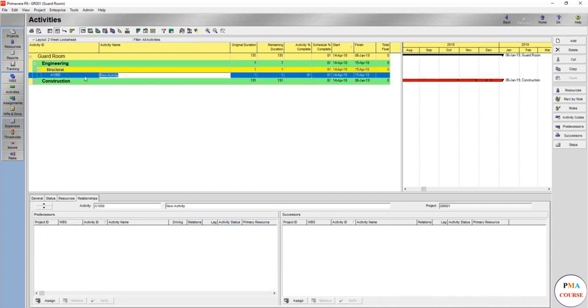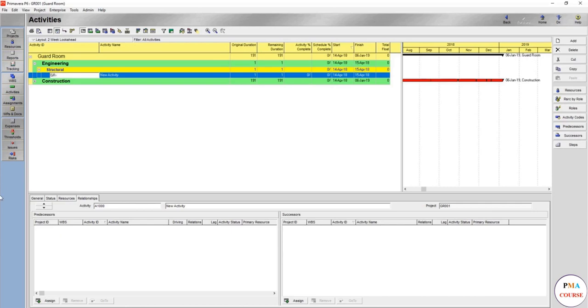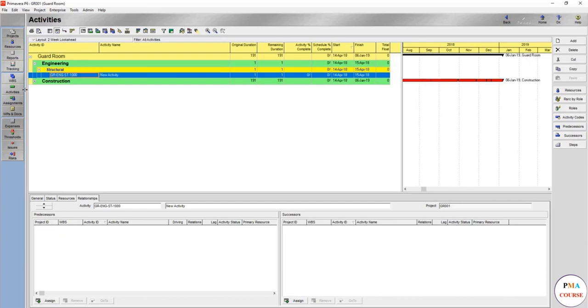So in the structural we will have again add a new activity, and the activity we are going to decide, for example, it would be GR. Here we should be careful not to use the structure as well. We might use ENG-ST for structural-1000, so here we have an activity ID that you can read automatically that this is a structural engineering.